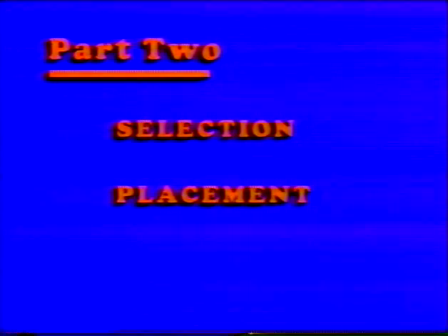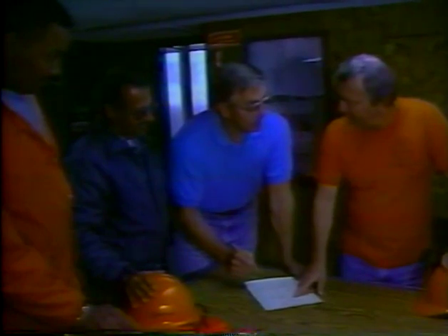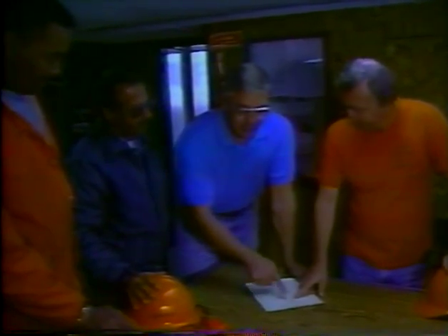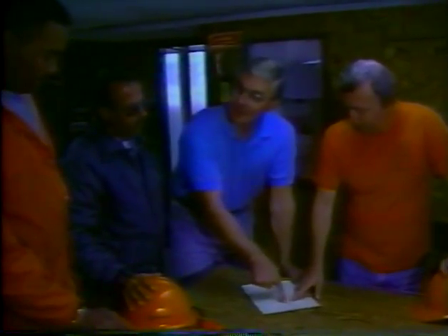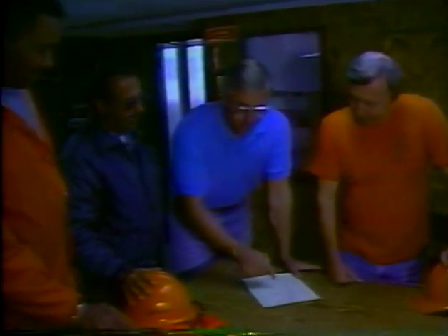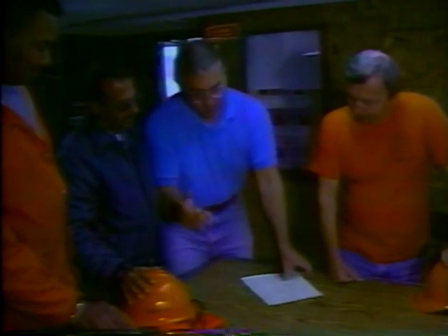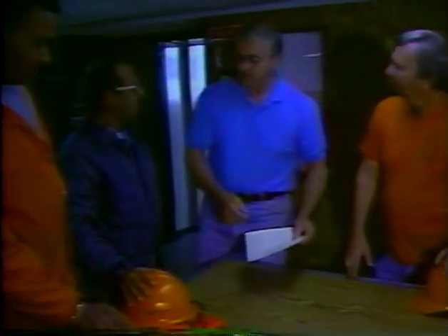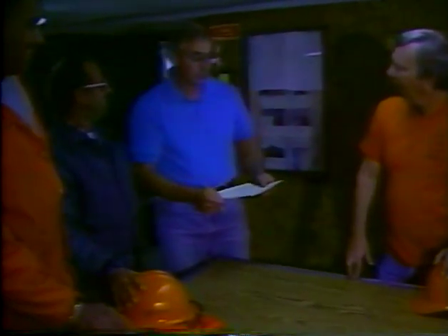Now let's talk about the maintenance of work zone traffic control. The maintenance requirements for work zone traffic control should be spelled out at the pre-construction conference and in the project plans or special provisions. Without written and agreed upon requirements, enforcing the standards is more difficult. Let's go over a few typical requirements. Maintenance of work zone traffic control primarily concerns two things: the position and the condition of the traffic control devices.